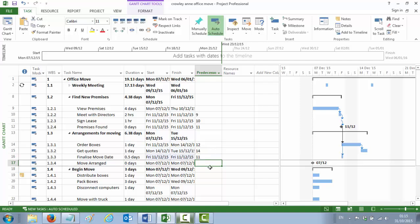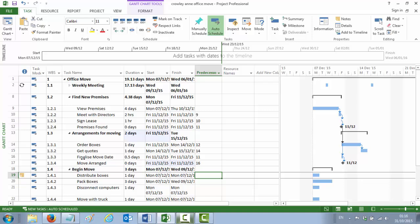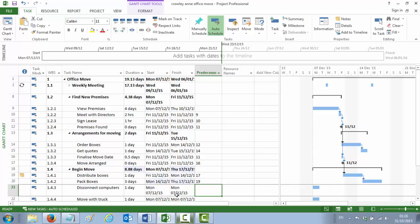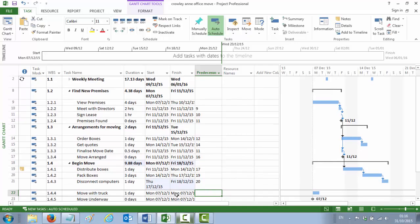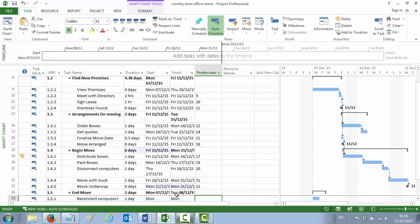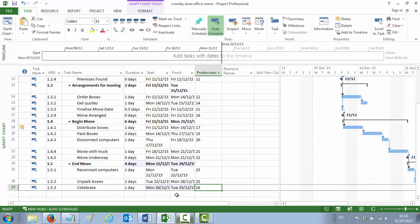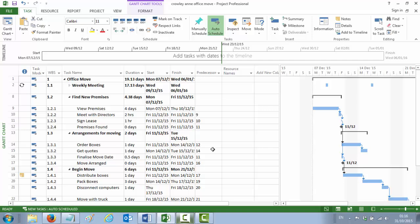Then we're back to everything following from the one before it. Move Arranged follows from row 16. Skip the summary row. Distribute Boxes follows from Move Arranged in row 17. Pack Boxes follows from Distribute Boxes in row 19. Disconnect Computers follows Pack Boxes — that's rows 20, 21 and 22. Going down to the final branch, End Move: Reconnect Computers follows from row 23, and Unpack Boxes follows from Reconnect Computers at rows 25 and 26. All your activities have now been connected in the Gantt chart, and your duration has become considerably longer because the activities are no longer happening at the same time. That's point number 10.